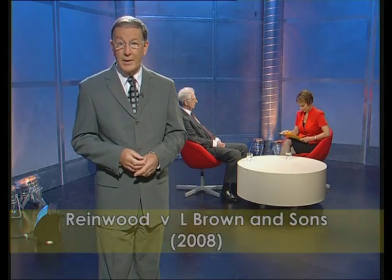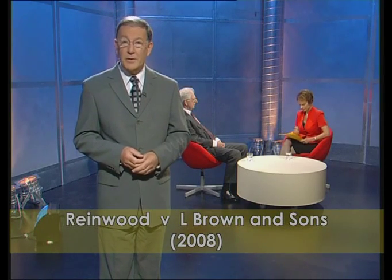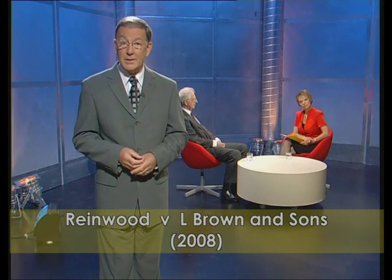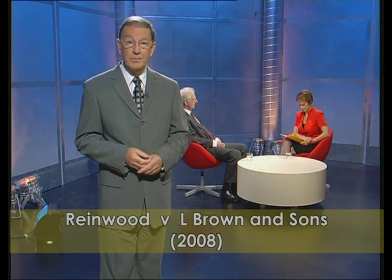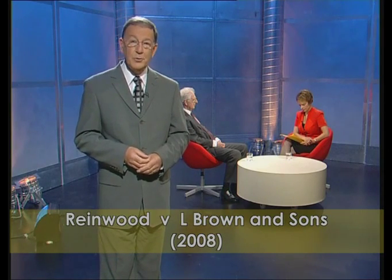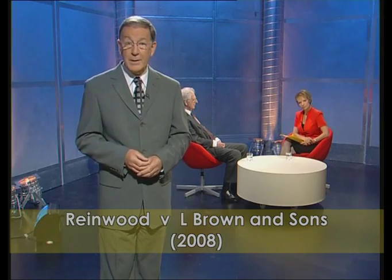Our first case is that of Rhinewood versus L. Brown and Sons, which was heard as an appeal in the House of Lords in 2008. The original case involved the granting of an extension of time to Brown, the contractor, after a withholding notice had already been issued and liquidated damages deducted by the client, Rhinewood. In the original case, the Court of Appeal found against Brown and ruled that the contractor had not had payment unfairly withheld. Roger, warm welcome.